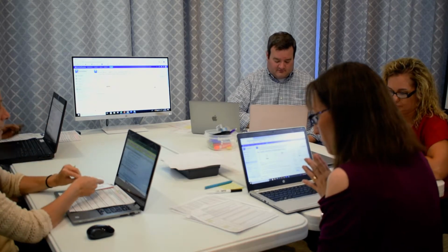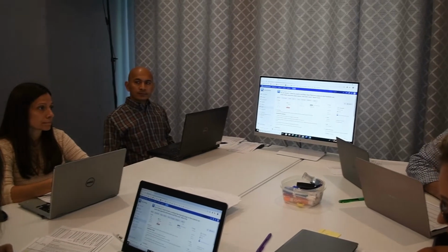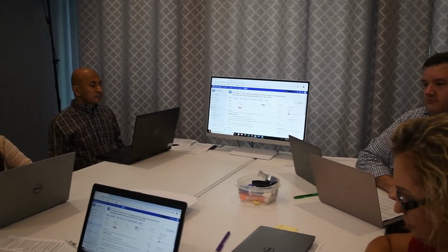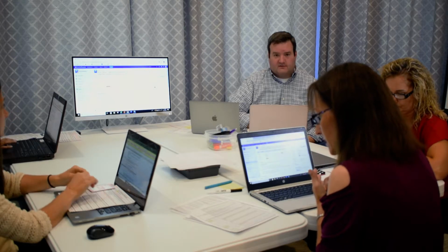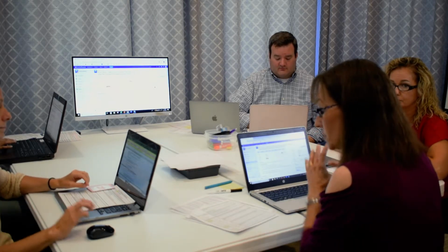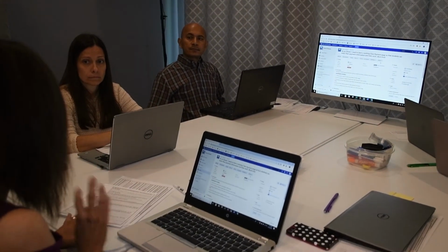So, I'm going to have a lot of testing, and we need to make sure everything is secure. Yeah, because of the credit card stuff. So how about this? Why don't I open another story and break the credit card functionality out completely into a separate story? Everything else will be here, the buttons you guys need to do, and the back end story like we did for all the other ones. And then I will do a separate story for the credit card part, and we'll point that separately.